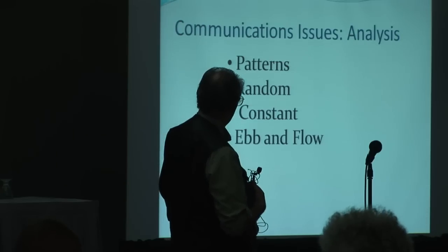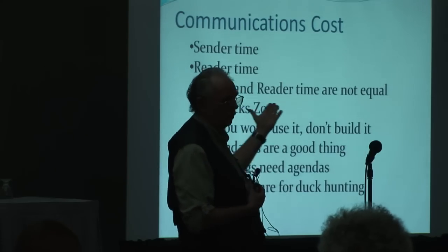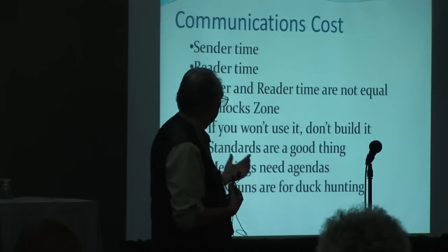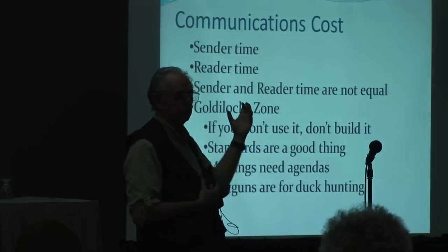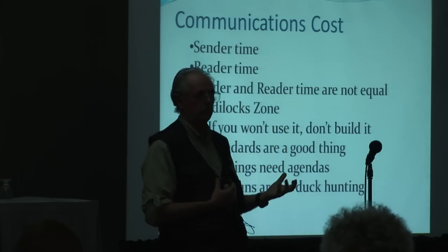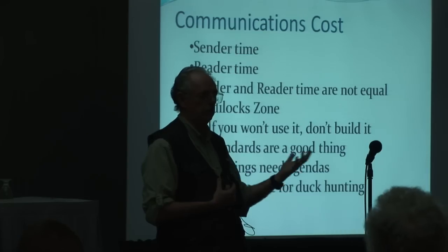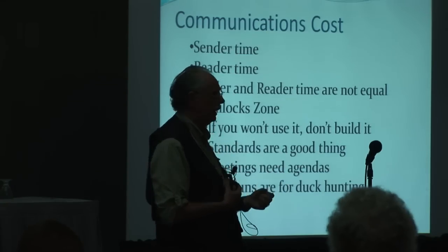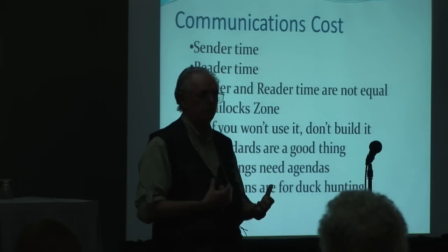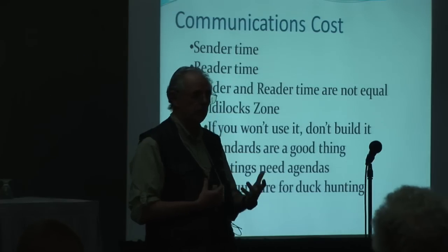Okay, so let's go to the one that I was expecting after that, talk about costs. There are sender costs, which means the time it takes for somebody to create the information that's going to be generated for either outside or for inside. It's the time that takes. There's the reader time, or the time it takes to consume that information. And they're not the same.